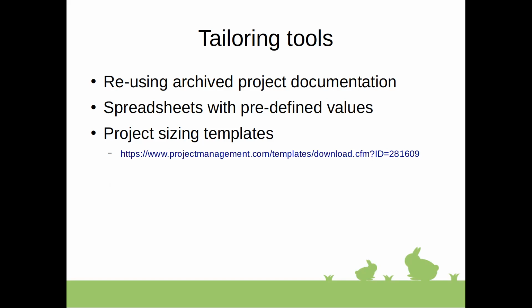And there is this agile approach, and agile means essentially you plan high-level goals, but you don't necessarily know every little aspect of every stage. So you plan in advance in detail everything until the next milestone. Once you reach the milestone, you again iterate with the same goals, milestone planning and everything for the next milestone.